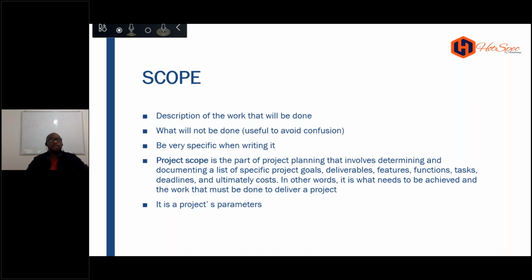In the future, if something goes wrong, they'll say, Joe furnished that house. No, that's the document. I only furnished the living room. Something is going wrong in the bedroom? I didn't do that job. It's in my document. It was out of scope for me, in scope for somebody else. So scope is either in scope or out of scope. Anything outside of your in scope is scope creeping. I defined it yesterday. Scope creeping is when you go outside.